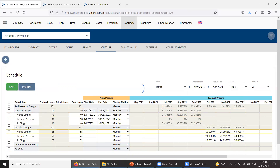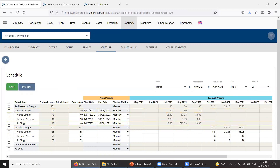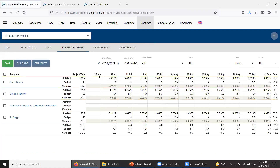The effort profile isn't that badly aligned to the milestone profile but it doesn't have to be and often won't be. The 85, 24, and 32 hours are now phased based on those percentages. The key bit that pushes this to the next phase is that I can now run cash flow reports — and if every project has done this, for new jobs not yet won there's a probability adjustment factor applied so if you think you're 50% likely to get it, it adjusts both effort and dollars.